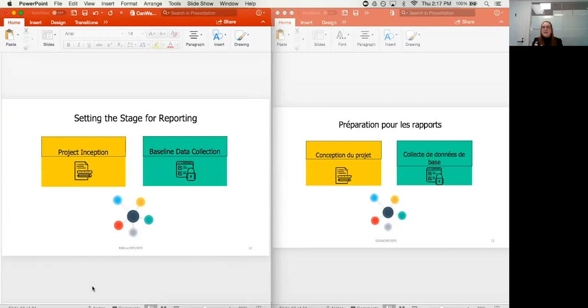And by upfront, I mean 90 days usually after you sign your financial agreement, or if you made special requests or modifications to your financial instrument, there should be a timeline for collecting baseline data. If you notice that you cannot collect on baseline data that you've identified in your PMF, it's important to identify that early and modify your PMF accordingly. Essentially, you want to find out earlier rather than later whether you're going to have challenges reporting on and collecting data.